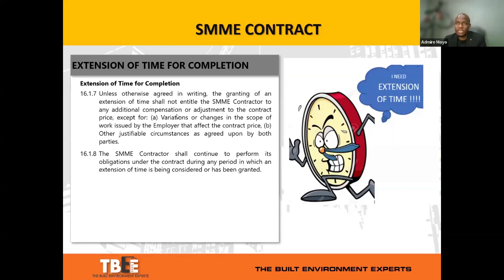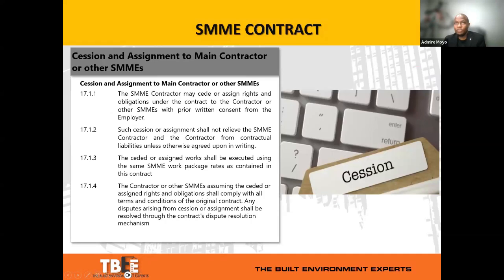And the SMME agent provides a recommendation. So irrespective of the extension of time request, the SME contractor will continue to perform their obligations under the agreement until the extension of time is granted or officially denied.